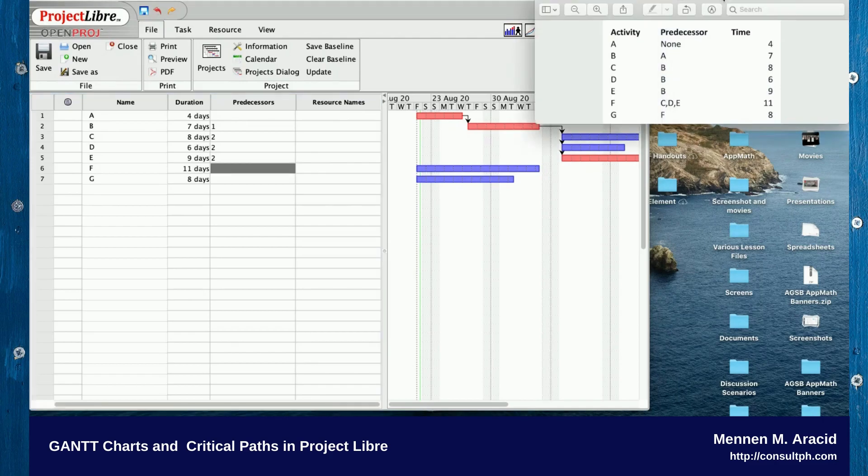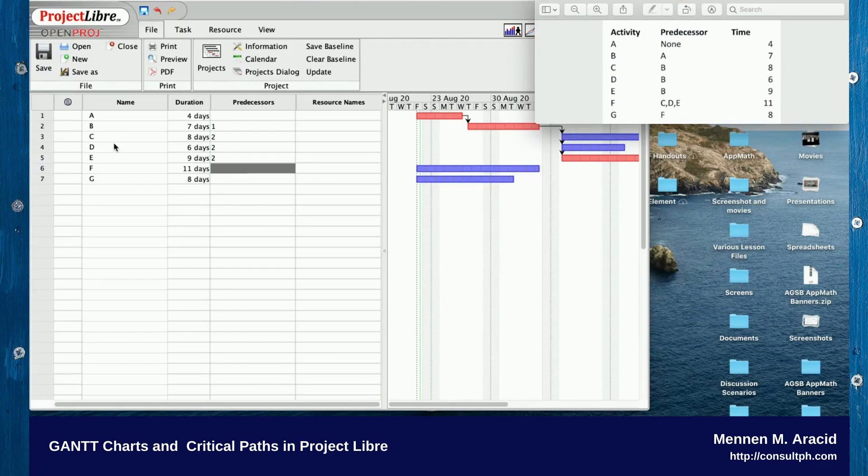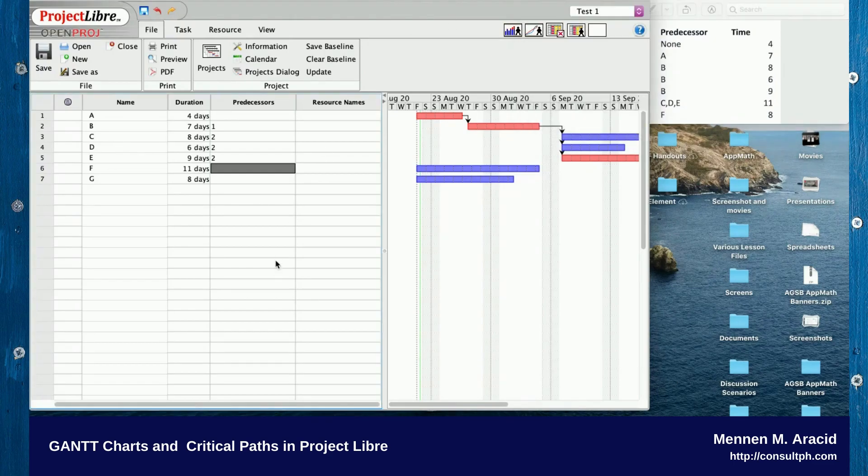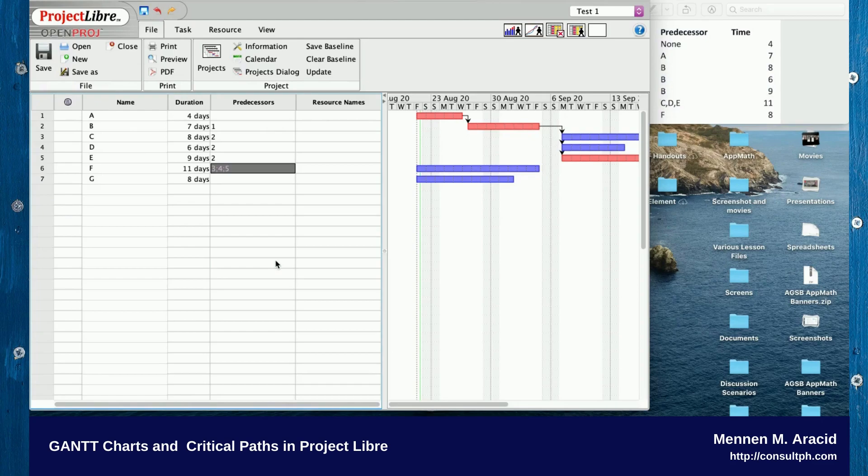The predecessor for F is C, D, and E. You notice C, D, and E would be three, four, and five. So that's three semicolon four semicolon five. In MS Project that's three comma four comma five. Then press Enter.